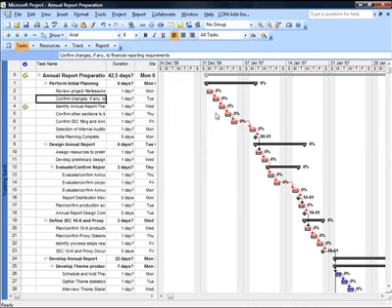If you see here carefully, for each activity now, I'm able to see two bars, a black one and a red or blue depending upon the criticality. The black bar is always the baseline bar. That means my planned schedule. The red or the blue bar will show me the actuals. To demonstrate it further,